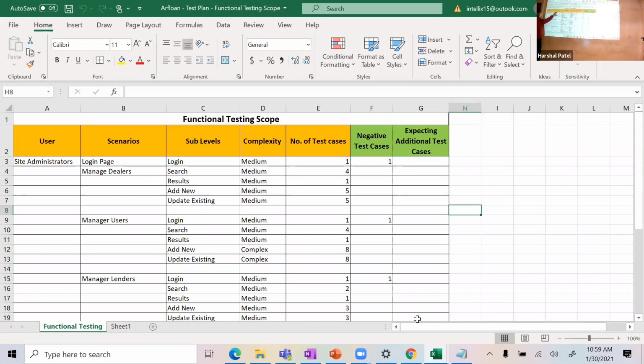And then I can say, do those scenarios have specific variants that I need to worry about? Just put it at a high level. I know I don't have test cases written, but now I can go more logical. If I want to test the login, how many test cases do I think I need? If I'm testing a search function, because a site administrator needs to search the dealers, probably a credit application, or maybe a lender, how many test cases do I need? So I can come up with a guesstimate of how many total cases I'm thinking about, instead of just coming up with a 70 to 80 number. With experience, you will probably come up with a better one, but there is still a risk involved in that estimate. So I would say, think about the scenarios, and come up with the test cases.